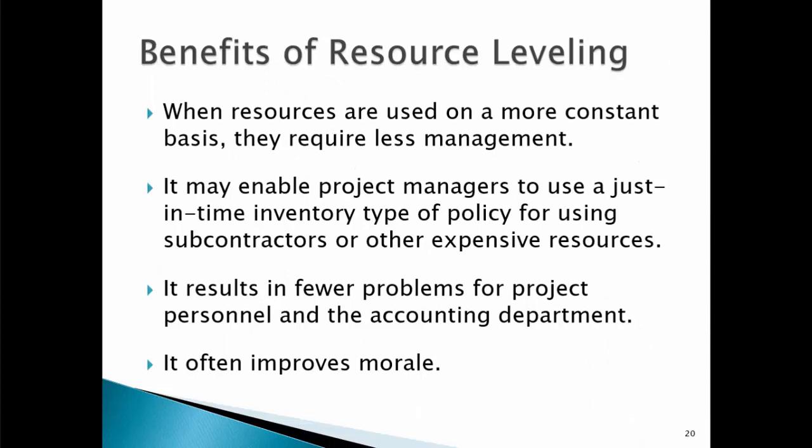From the example and from previous slides, we conclude that resource leveling requires less management. It may enable project managers to use a just-in-time inventory type of policy for using subcontractors or other expensive resources. It results in fewer problems for project personnel and the accounting department. It often improves morale.